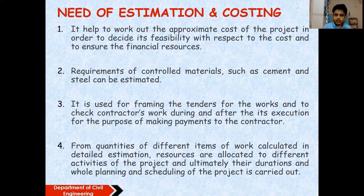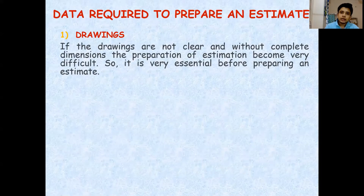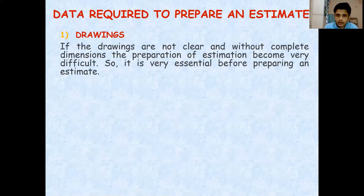For all these reasons we need estimation. Estimation is a part of the entire project planning phase. The data required to prepare an estimate starts with the drawings — plan view, sectional view, right view, left view, front view, rear view, etc. From these drawings we find out the volume of work for different items: in the foundation, the RCC work, PCC work; in the beams, columns, and slabs.